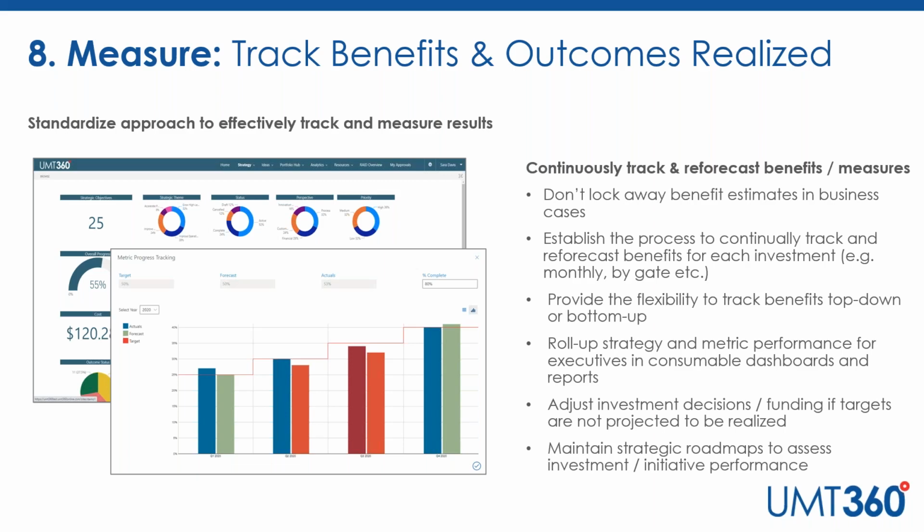So whether we're in 100% agile execution or 100% traditional execution, the ability to do benefits realization comes from the definition of the strategy, the definition of the metrics, the impact assessment of the work against the metrics to show the contribution, and then to track against that at the right cadence, whether that's through the life or at the end of life.